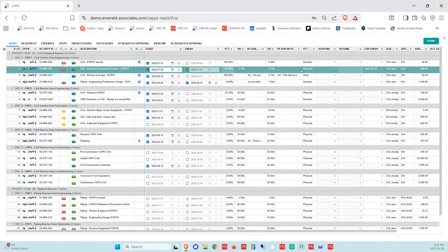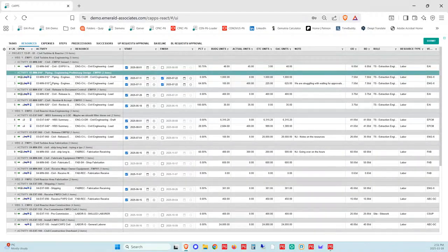So this is a physical percent complete type, which if you use that in P6, you can use your steps to do the updating against. And in this case, it's 60% complete because of those two that I did. Now, some of you might use resource as your way of doing updating. Okay, so we can use that too. So that's this little icon here, and this moves over into your units-based updating.